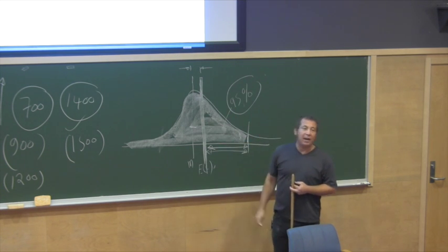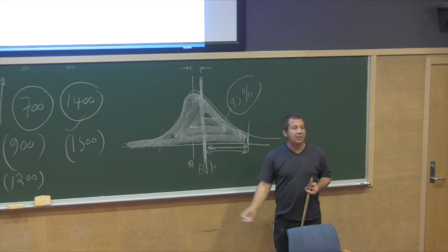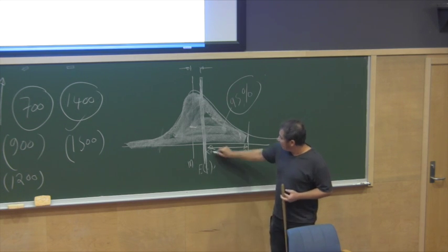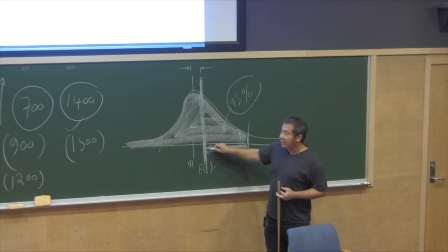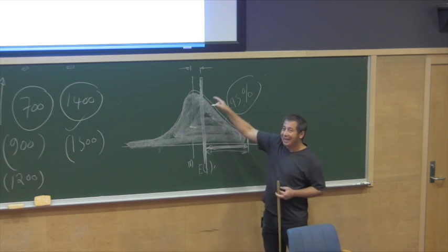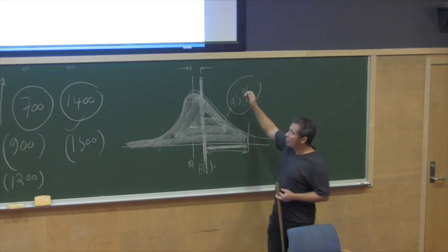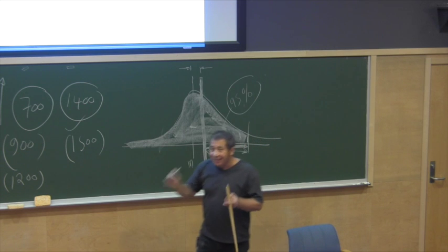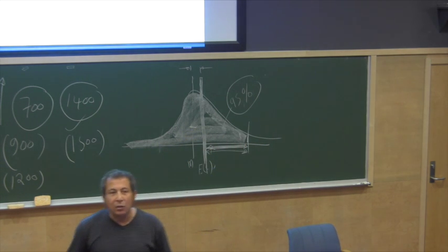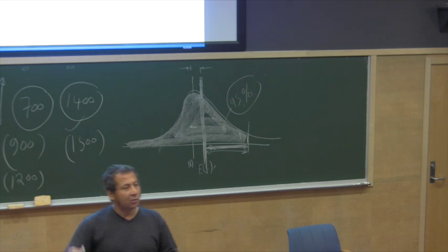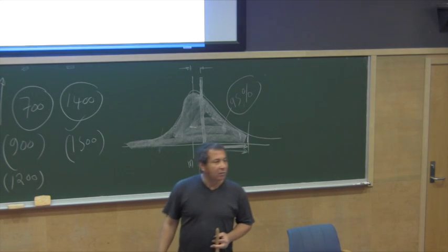And then you should find the variance or the standard deviation. And here it will tell you how many of these standard deviations are needed to add to your base estimate, in order to find out this managerial contingency to make you confident in your project costs.